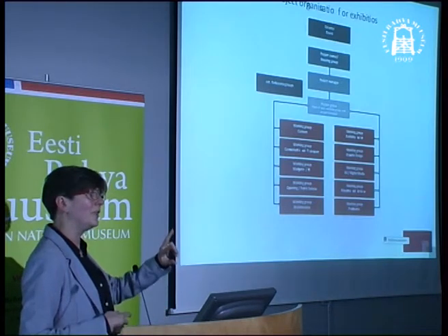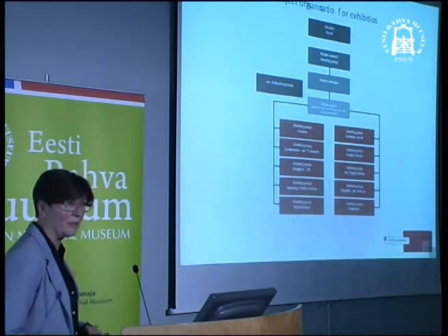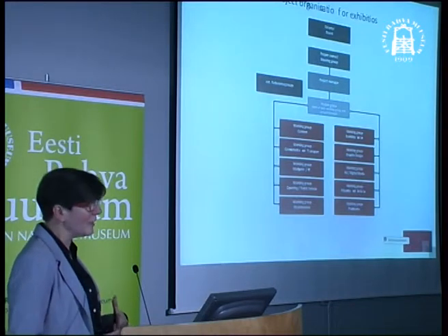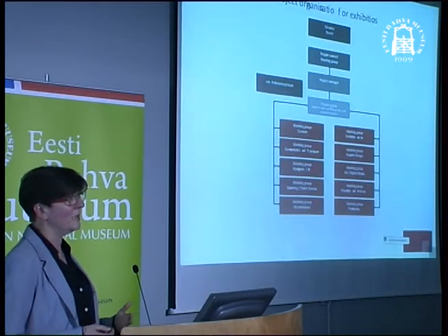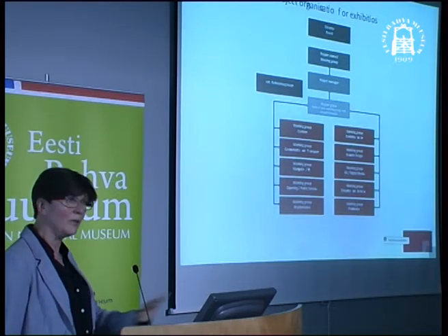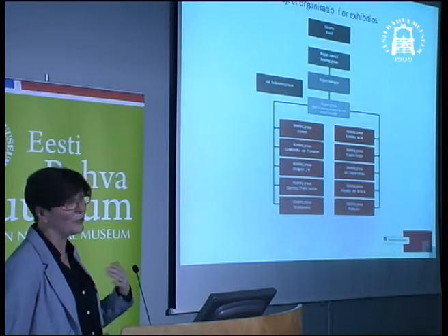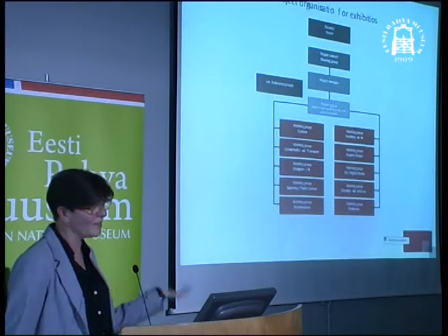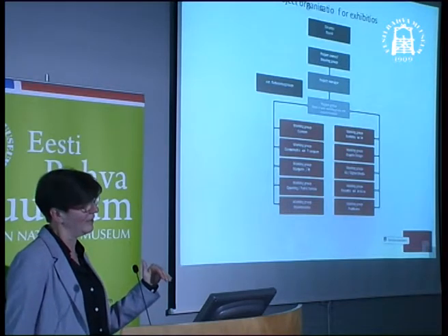So at the moment, we are doing two things. We are working in our own profession, and those who got trained as a project manager work as a project manager. And that means that it can also be a curator, but this project manager never comes in with other professional work. So a project manager is only doing project managing. If I'm the project manager, I don't do the graphics. Then I hire somebody else to do the graphics. If a curator is the project manager, the curator does not do the curating of the exhibition.